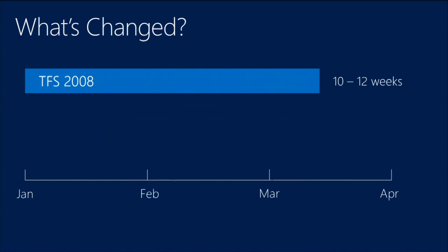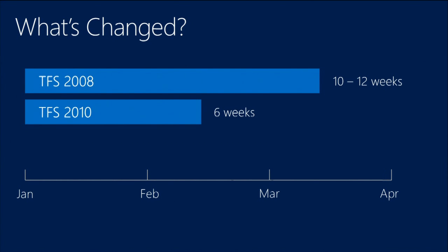Okay, our sprint cadence. Like I said yesterday, we were playing with the idea of allowing teams to pick their own sprint cadence, how long, when they start, when they end, and it caused so much chaos and confusion. We just said, look, we're all going to work on 3-week sprints, everybody. Everybody's going to start on the same day and end on the same day. It solves a lot of problems and really doesn't cause any problems. I went through this yesterday: we went from 12 to 6 to 3-week sprints. So right now we're on this 3-week cadence.